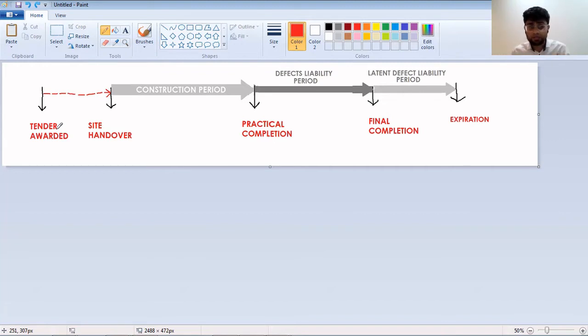Now, there are times when the contractor will be held liable for such issues, and times when he wouldn't be, when it's not his fault. And so this practical completion date, although it's determined, can move depending on whatever happens. Say COVID had happened, then the practical completion date had to be revised because we've had this force majeure, this worldwide event that was beyond their control or their scope. But say the contractor had bad planning, then he may have to pay penalties. He'll have to do something to rectify the situation.